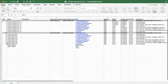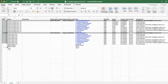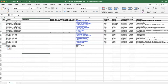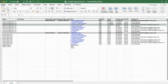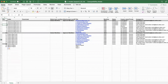One other thing to call out: when you get an error, look for the key number. The key column needs to be filled down so there's a number per actual row. I use this little trick: highlight a few cells above, Excel picks up on the pattern, and drag it out to the needed row. When you use the import tool and run into an error, it will tell you which key has the error. Look at the formatting in that row, fix it, save the new version, and try uploading again. If there are no more errors it will load; if there's another error it will find it and let you know.